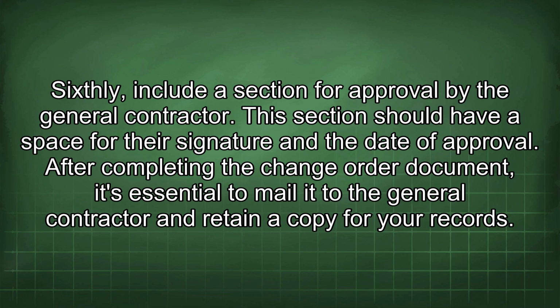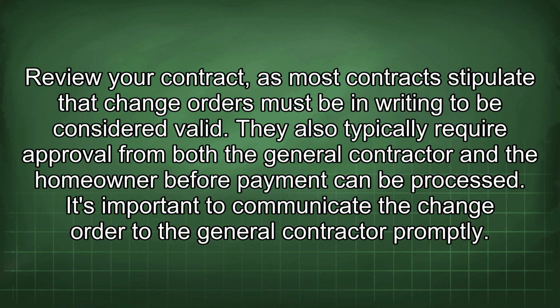After completing the change order document, it's essential to mail it to the general contractor and retain a copy for your records. Review your contract, as most contracts stipulate that change orders must be in writing to be considered valid. They also typically require approval from both the general contractor and the homeowner before payment can be processed.